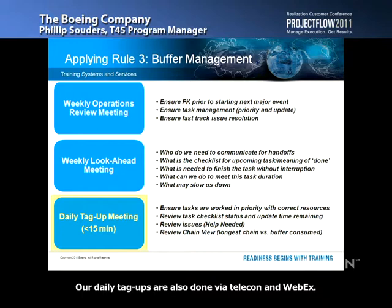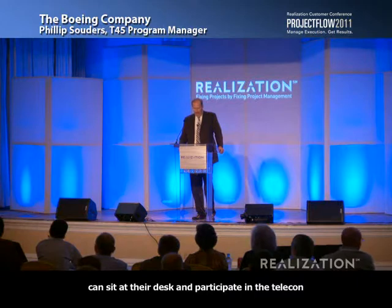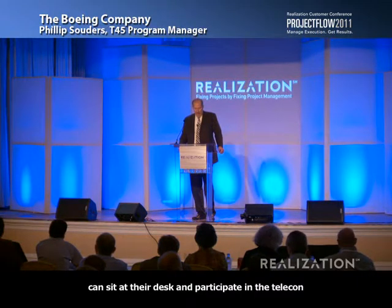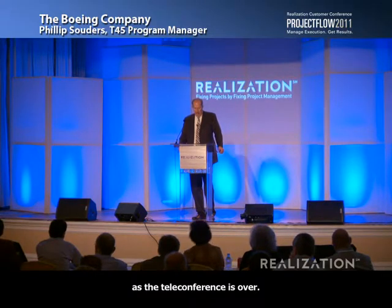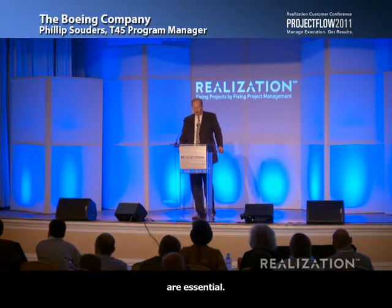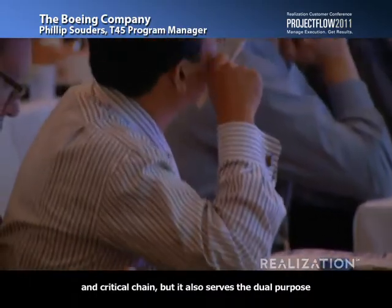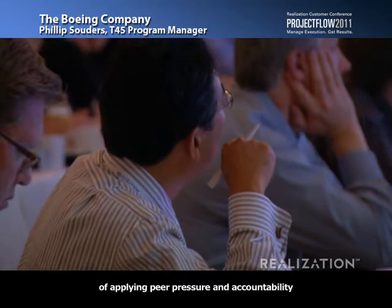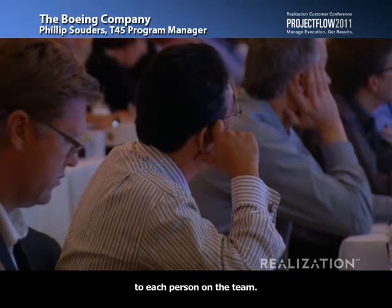Our daily tag-ups are also done via Telecon and WebEx. So each engineer or each task manager or each manager that's involved with the process can sit at their desk and participate in the telecon and are immediately back productive as soon as the teleconference is over. But we find these teleconferences and WebExes for these meetings are essential. And it not only provides daily perspective on your critical tasks and critical chain, but it also serves the dual purpose of applying peer pressure and accountability to each person on the team.